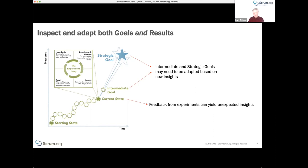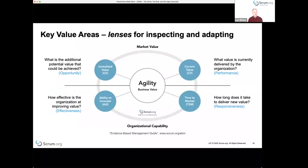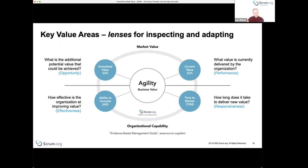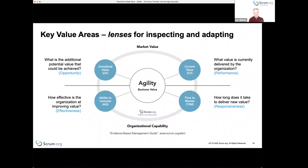Evidence-based management consists of this goal-seeking model, supported by things called key value areas, which I think of as lenses for inspecting and adapting. They give us the ability to focus on different aspects of the problem. These four key value areas are: unrealized value and current value — which focus on market value — and ability to innovate and time to market — which focus more on organizational capability to deliver market value.